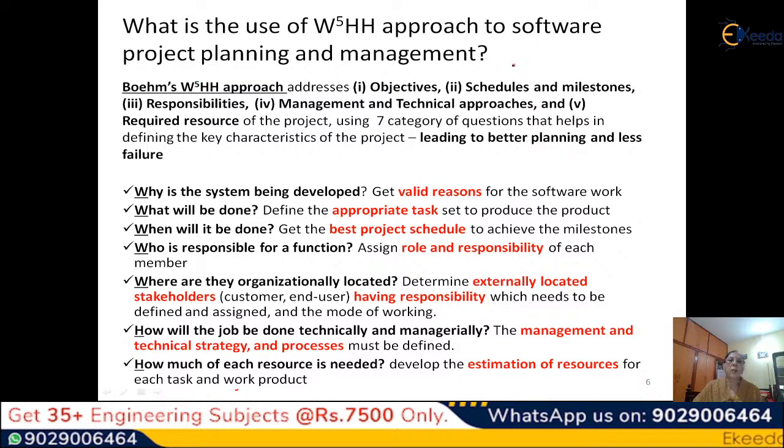And this approach is given by our software engineering guru Boehm, and it addresses 5 things: objectives, schedules and milestones, that means when what will be over, responsibilities, who will take what responsibility, management and technical approach, and required resources. And all these 5 things can be addressed by using 7 categories of questions, and the 7 categories are basically what I have listed here.